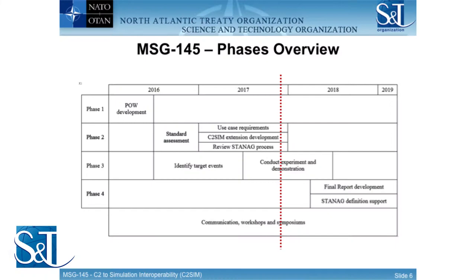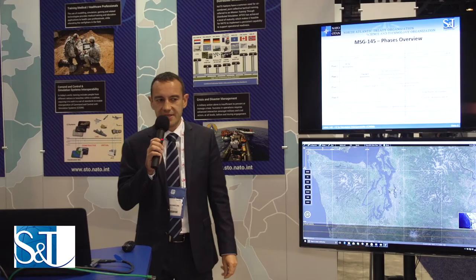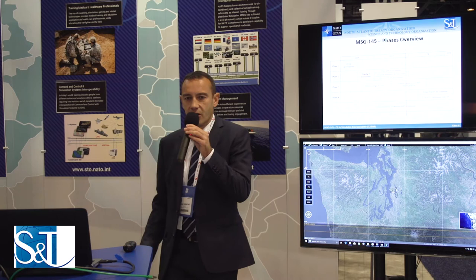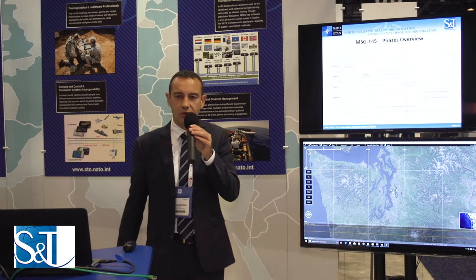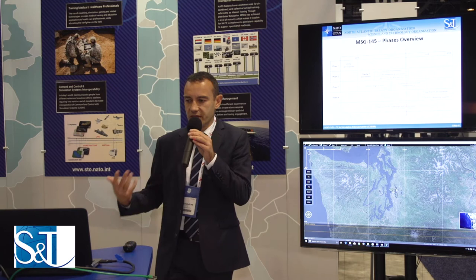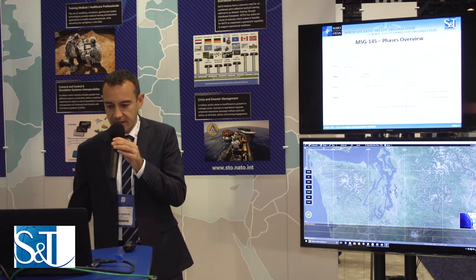This is the roadmap — the different activities scheduled at the beginning of this technical activity. We started in 2016 and are more or less in the middle. We started with a theoretical C2SIM standard assessment, and right now we are in the implementation and experimentation phase, experiencing different use cases where C2SIM is applied. Next year we move to final report development and advancing the STANAG.